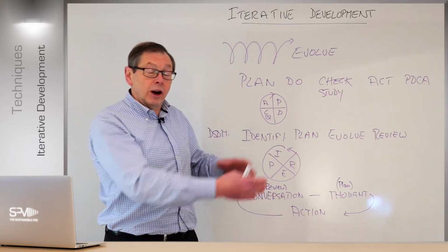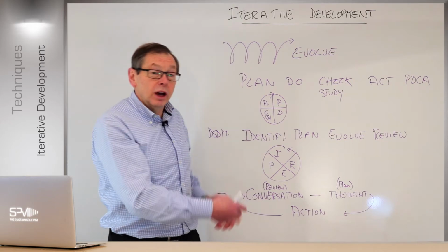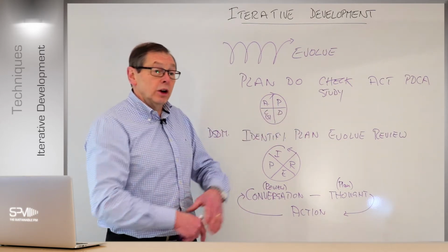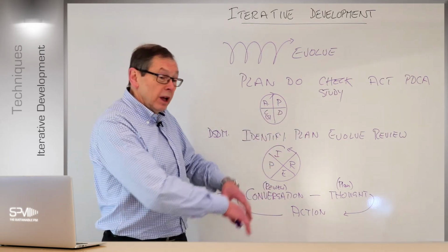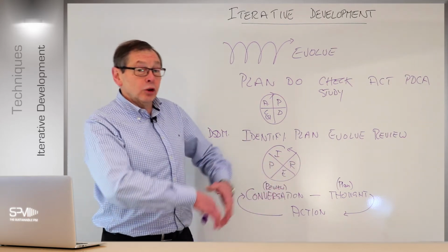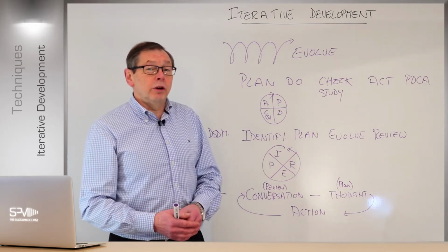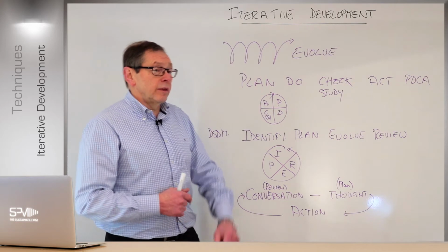If we do run out of time, we look at the critical elements, the ones we must deliver within that time box, and we'll take elements out of it. This is the core of a sprint in Scrum. It's the core of the DSDM solution development time box in Agile PM. It's the core of all iterative development, right? And that's really the most practical approach to take. And this is where iterative development works.